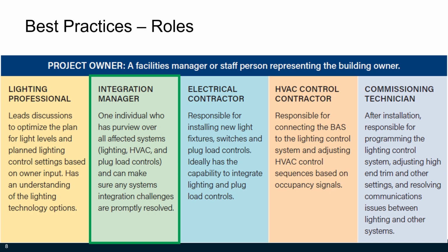The integration manager role could be filled by the facilities manager, an energy consultant, a lighting professional, or any other roles identified here. The important thing is making sure someone is accountable for this coordination role. The typical HVAC integration project proceeds through planning, design, and then construction phases.